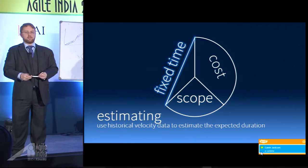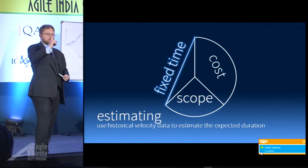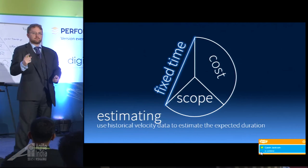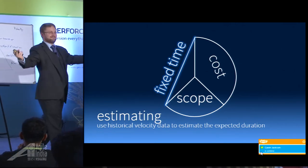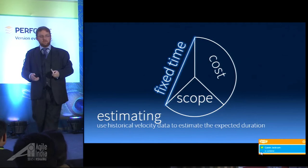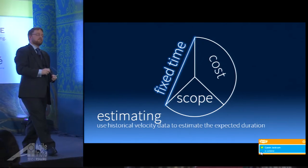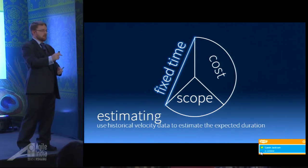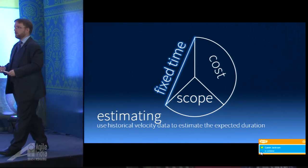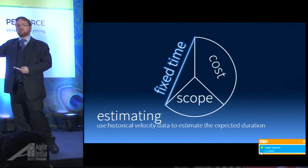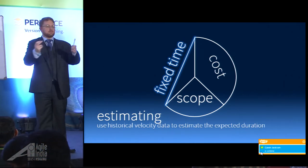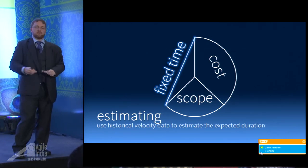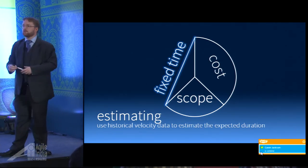Who estimates a story point? The team. What is one story point worth? How many hours is one story point? So when we have historical velocity, if we have a consistent team who've been together, we have historical velocity data for that team and we can draw a progressive trend — your velocity measures are more or less stable, with always some level of deviation. We can use that as a baseline.